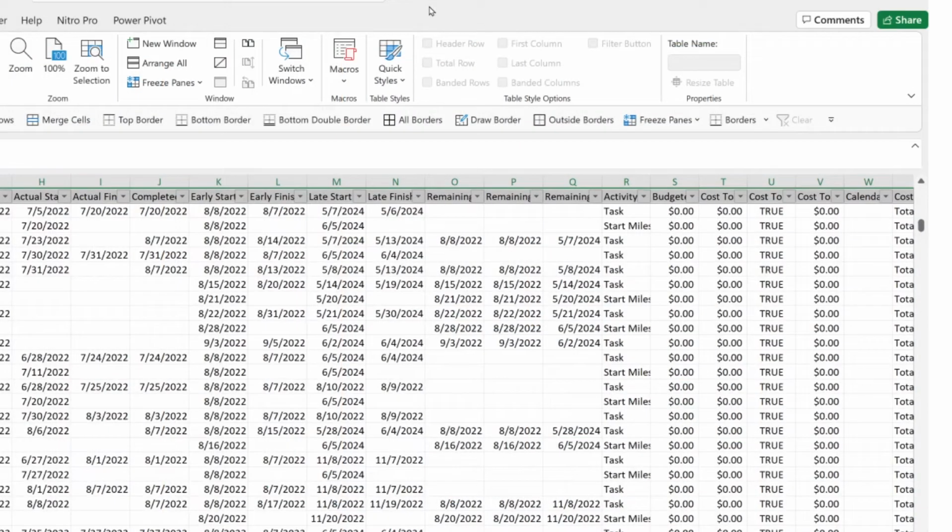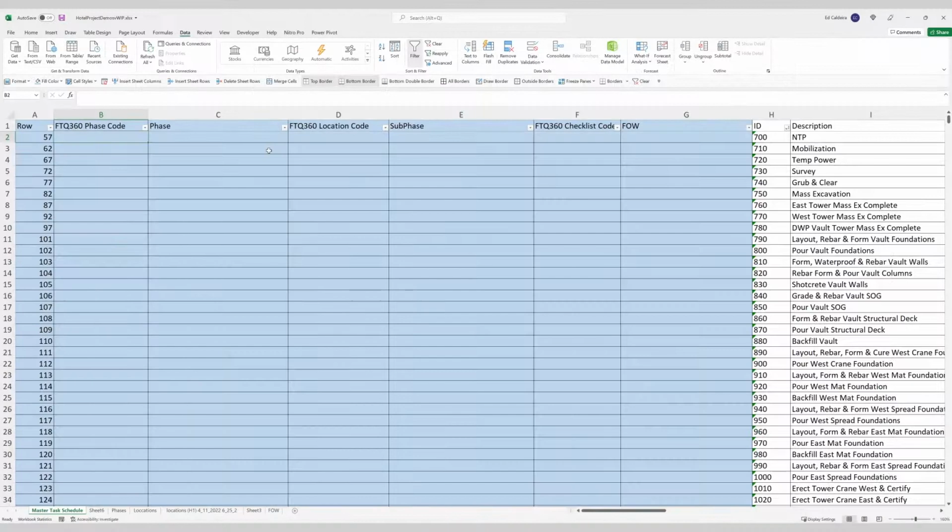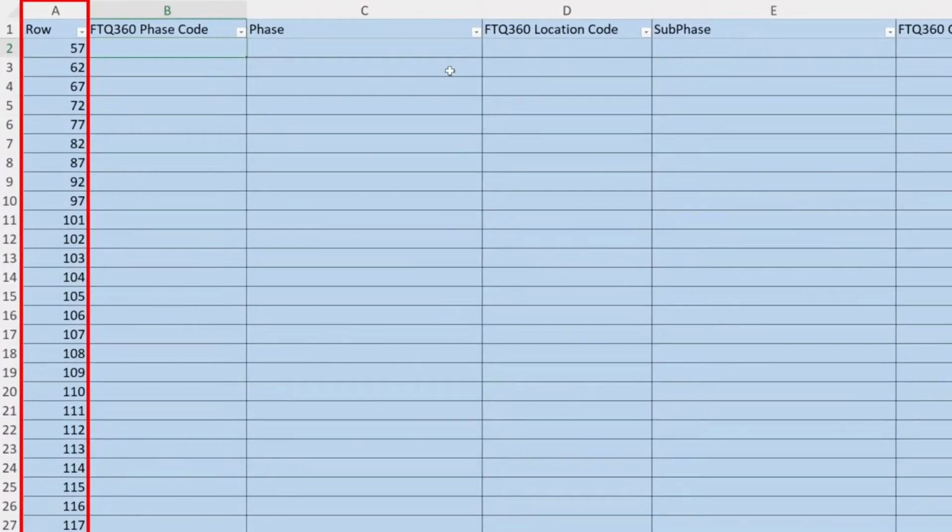We exported the project plan in Excel format. Then we inserted 6 columns that we were going to be working with. In the first column, we added a row number so we could always resort back to the original order.